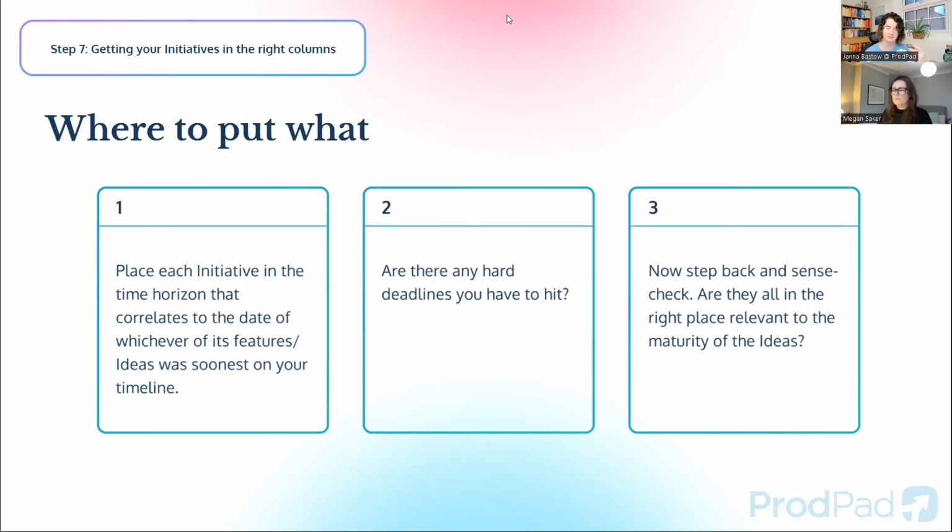If that happens, you've got to put that on your roadmap. Sometimes it's more around a time sensitive feature, something that's only relevant to your users at a particular time. And if you miss it, it kills the success of your feature. If you're building for the academic school year or for a Christmas rush, you need to get certain things out. Otherwise, you've got to wait till next year or not at all. If it's commercial, if it's externally driven or strategically important, either to your commercials or to the way that your business runs, then you might need to put those dates on as well.